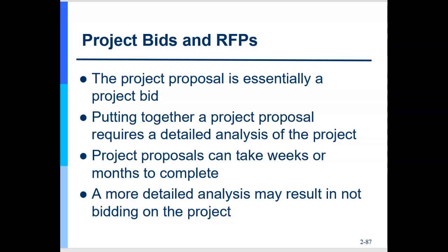You will, as the project manager, work with a procurement manager, but you are wholly responsible for the project. We established that in chapter 1. But the procurement manager is responsible on behalf of the company for legal reasons for committing funds. So you want to make sure that procurement manager and their team understand your scope.